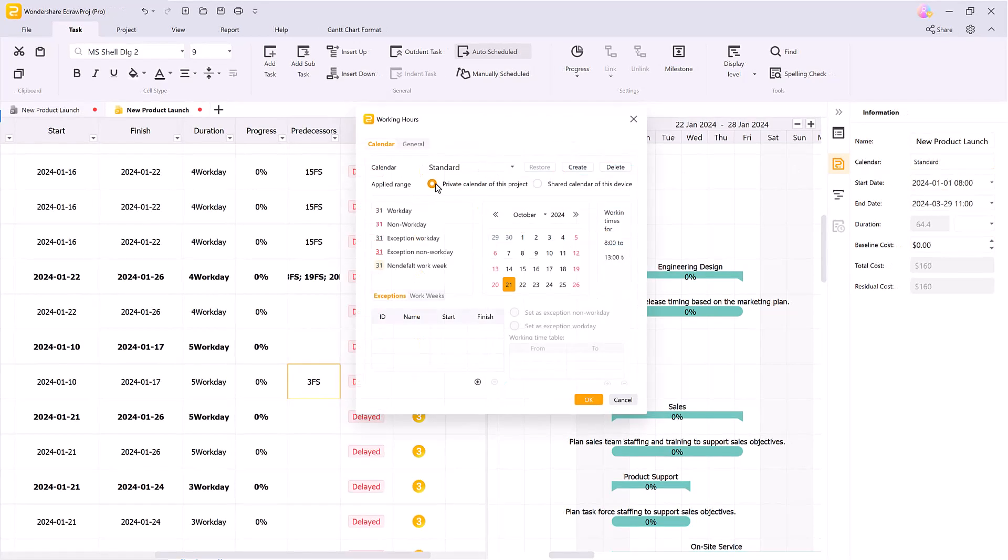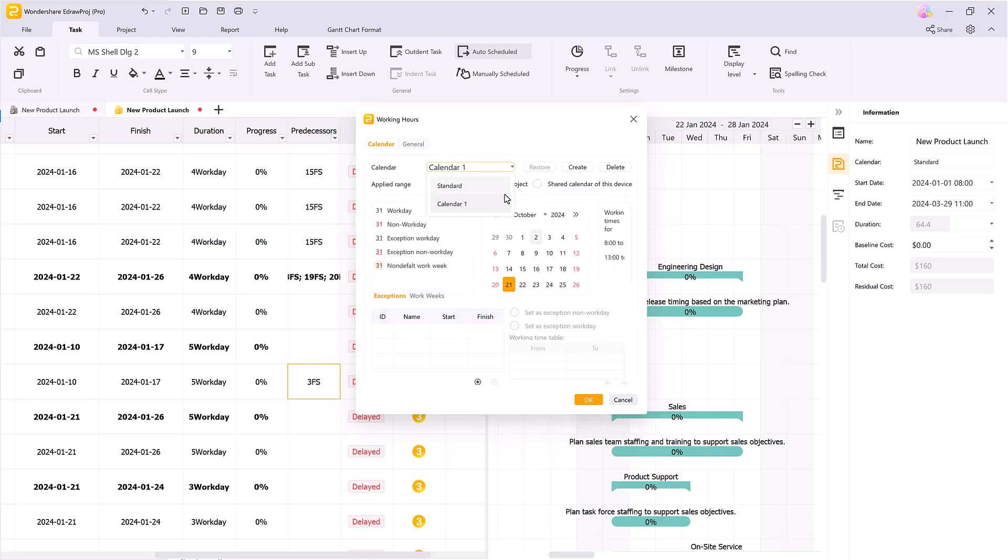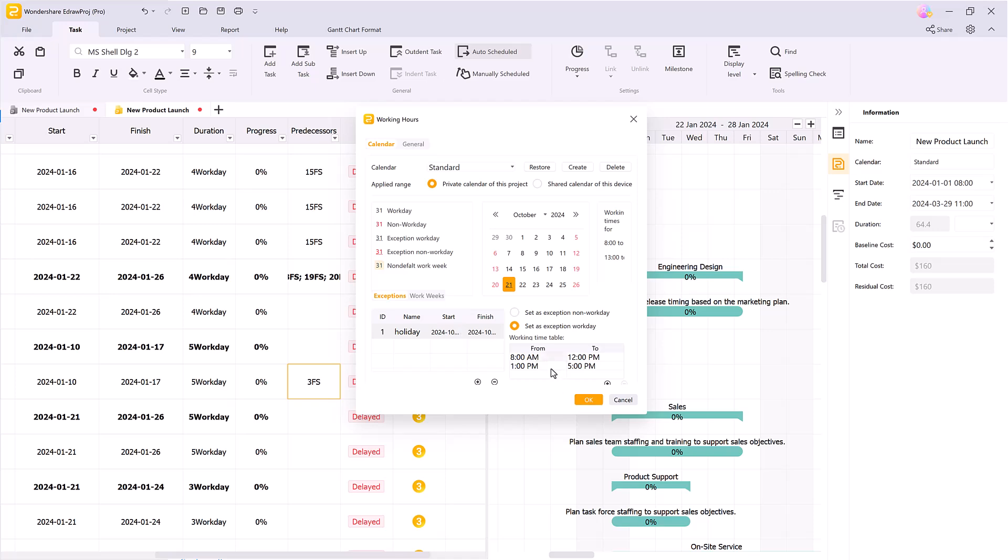For time or working hour management, simply click on the calendar. You can set a private calendar for your device or a shared calendar so that other projects can reuse it. You can also create or delete a calendar and set exceptions for working days.